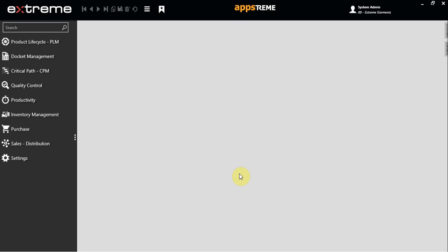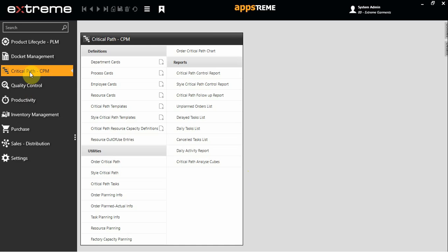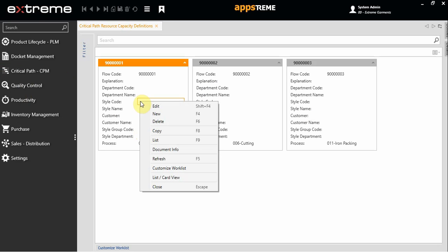Hello, in this video session I am going to show you how to make resource capacity definitions. To do this, click on the critical path menu and choose Resource Capacity Definitions worklist. Right click and choose New to create a new definition.